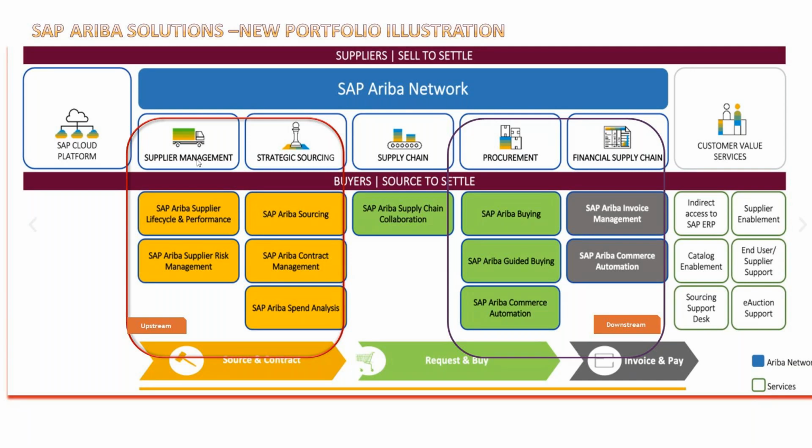Along with the consulting team, we will have some 4 to 5 employees who will be dedicatedly working to onboard all these suppliers into Ariba. This will be a 3 to 4 months activity where they have to speak with the suppliers to get the information and upload it successfully in Ariba. It takes 3 to 4 months because loading is not the issue, the issue is for suppliers to register themselves successfully in Ariba.